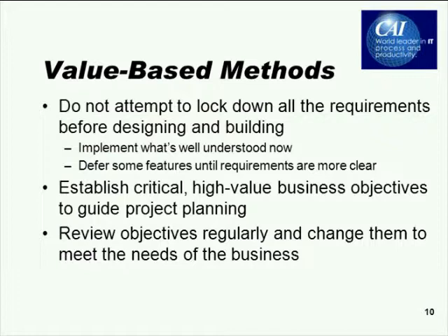Something may have come along midway through the project that's considered high value and needs to be accommodated in the project plan. In a plan-based method, that would be very hard to accommodate because you've done your requirements, you've done your design, and something that's introduced new in the middle of the project could really derail the project. But we'll see that Agile methods, which are in the category of value-based methods, can accommodate changing requirements and business objectives.